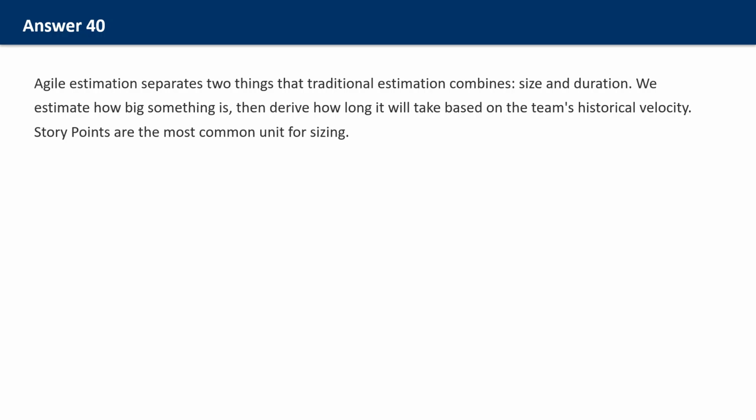For exam scenarios, planning poker is appropriate when estimating backlog items, particularly during sprint planning or backlog refinement. It works best for moderate-sized backlogs. For very large backlogs, faster techniques like affinity estimation or t-shirt sizing are more efficient.